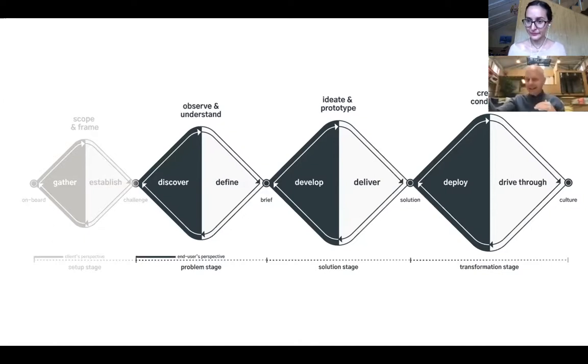Part of it is explicit. You're aware of it, you can tell people, and part of it has become part of you, and you don't think of it anymore. You just know. And you bring it along without consciously saying that this is your experience. This is this idea of explicit and implicit knowledge. What you can pass on in a Word document or in a database is what you know explicitly. But what you bring to the table in terms of implicit knowledge, things that you don't even think about anymore, is really important. It's all the stuff that you experienced in the research phase, and you bring that to the table. And you shouldn't drop people out of different phases of the projects, because you will lose knowledge.